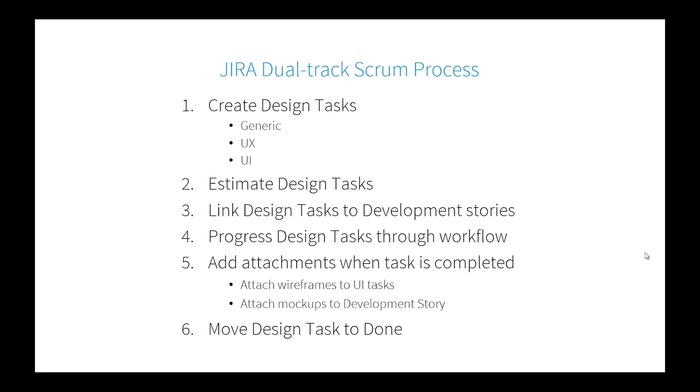What we're going to talk about is a process we've been using. You can see we've started to formulate a workflow that allows designers to create tasks that are design tasks and then implement those within the same scrum board. You can plan out ahead by creating dependencies. We create the tasks first, we'll estimate those design tasks, link those to the corresponding development tasks as blockers.